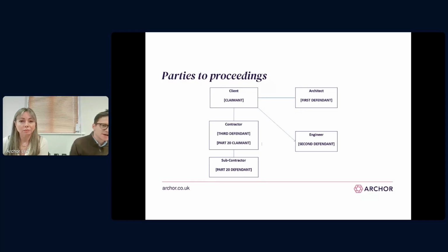As Hannah mentioned earlier, for those reasons, you really want to ensure that the dispute resolution provisions in your subcontract and consultant terms line up with what's under the main contract, because if you want to bring the supply chain into an upstream dispute, you don't want to be stuck in a situation where you can arbitrate upstream but not downstream, because you probably won't be able to bring those parties in.